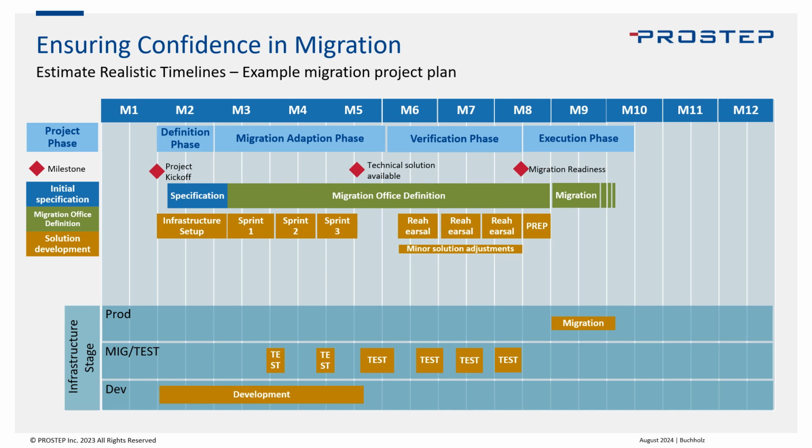Then you go into sprint methodology. So sprint 1, sprint 2, and so on. Each sprint is usually 4 weeks long and incorporates 3 weeks where the migration pipeline is customized and configured. Then in the last week of a sprint, you want to perform a short migration test with limited amounts of data, so that in that week you can test this migrated data in the new system, in a test system or a migration system, with the business together. This will raise the actual confidence of the business users that this will work out.